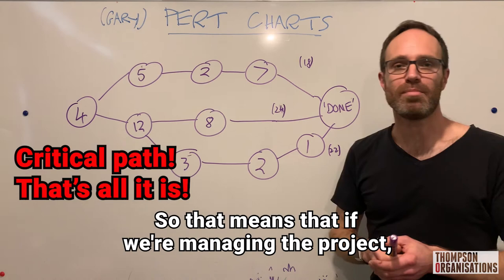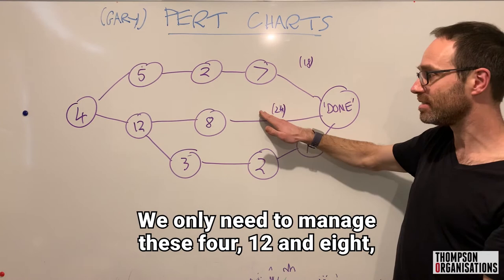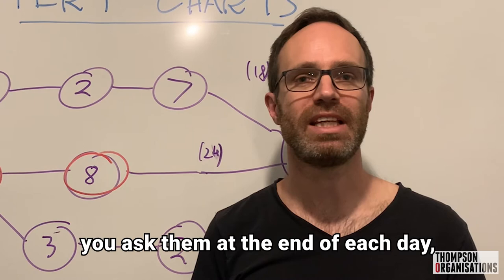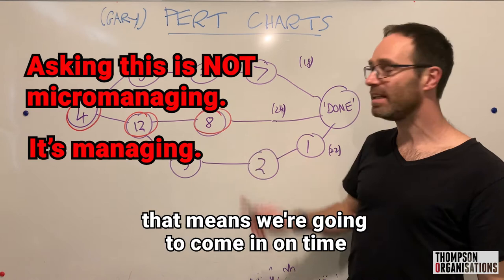So that means that if we're managing the project, we don't need to manage all the tasks. We only need to manage these 4, 12 and 8, which means the people who are assigned those tasks are accountable for them. You ask them at the end of each day, how many more days is that going to take you to get it done? And when you do the math, if it still means we're in there, that means we're going to come in on time and you can adjust accordingly. You can set a buffer at the far end of the project if you need to.